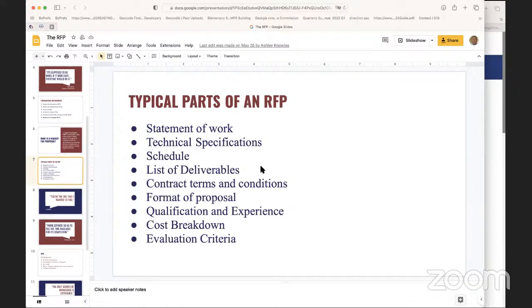They'll always have conditions. Somebody asked me the other day, because here we are in an election, and I don't want to get too much politics in this, so stay away from it. But we saw in the past where government closed and shut down for months, and so you could find yourself in a situation where there are delayed payments. You have to be aware of that and make sure you can read that and understand that, and that you are able to fulfill the contract regardless. Okay, they almost always, and this has happened a couple of times, catch up, but it's very concerning to a small business when you're counting on that and then they're not able to fulfill payment.